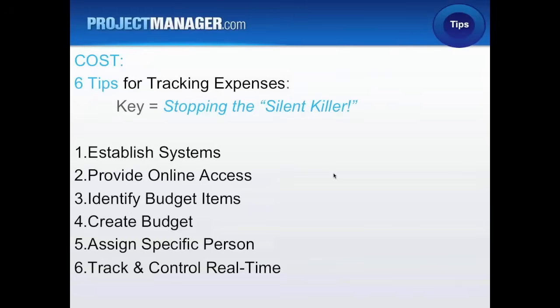Number 3 is identifying budget items, and the budget items being remembering to account for the fixed budget items, their variable budget items, and then once you identify them, you've got to account for, again, all the resources, whether they're people, they're employees or contractors, because they have different types of costs associated. You've got to know, like, office space or lease space. There's equipment, their computer, their license, legal, accounting, all types of budget items to include.